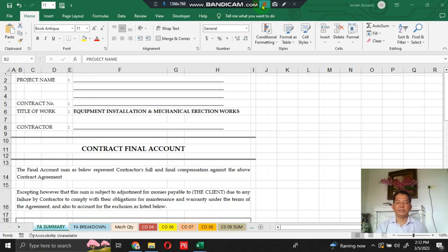Final accounts is the conclusion of the contract value, including the necessary adjustments, starting from the final contracts and supplement contracts, consisting of contract discovering, change orders, additional works, field notices, and supporting works, for example, for civil works and supporting works for pre-commissioning works. This final account includes all works that are payable to the contractor according to the contract.